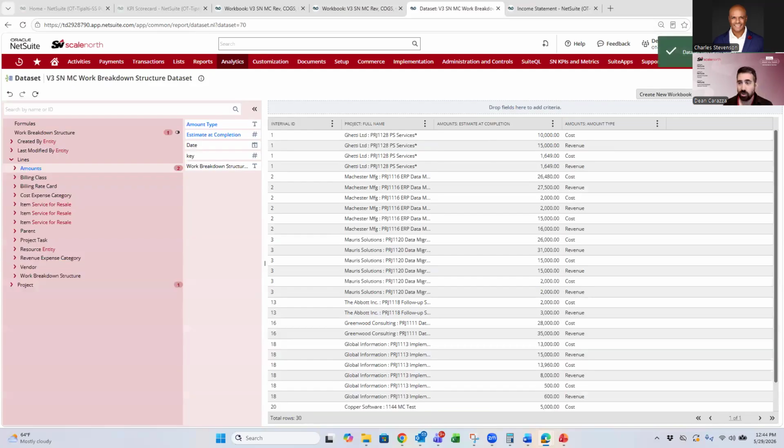Okay. So I have our two separate, independent data sets. We have our transactional, which is our actuals, and has the projects in it. We have our budget, which is this work breakdown structure, and has our projects in it. We're going to try to create some formula fields that can also be used to join the data sets together, so we can easily put them on a pivot table later and start to look at what the picture looks like.